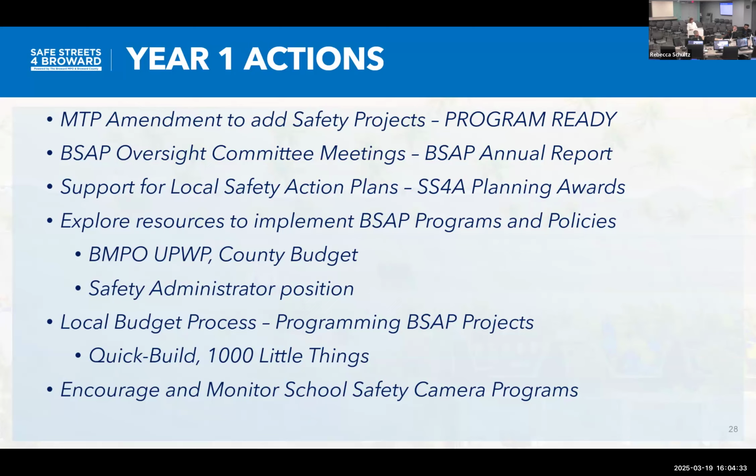So the program formerly known as C-SLIP, I think it's becoming Roads for Economic Vitality. Is that right? Something like that. Yeah. So there's a competitive program where our agency partners can come in and apply for funding. And for those, we can use the TAP funds, Transportation Alternative Funds, for projects that aren't on our federal aid network. So as we go through each of the different recommendations, we need to understand the plug and play to make some of the projects move forward.